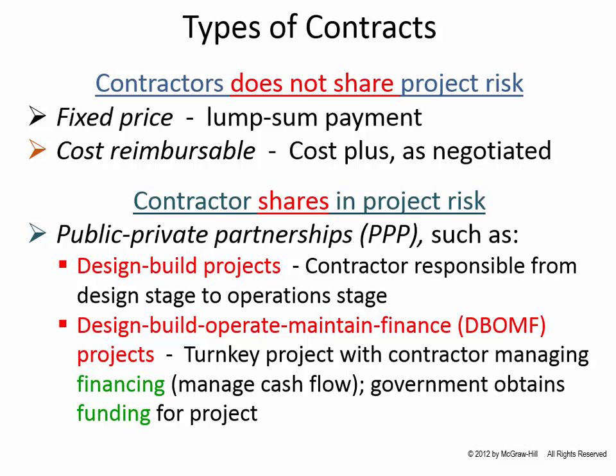Sometimes the engineers and the contractor can have a lot of miscommunications, and that's avoided in a design-build project because the design and the construction of the project is more closely coordinated. And that may include that the contractor is in charge of operating the project. And when they're in charge of operating the project after it's built, then they have an incentive during the construction phase to make things functional.